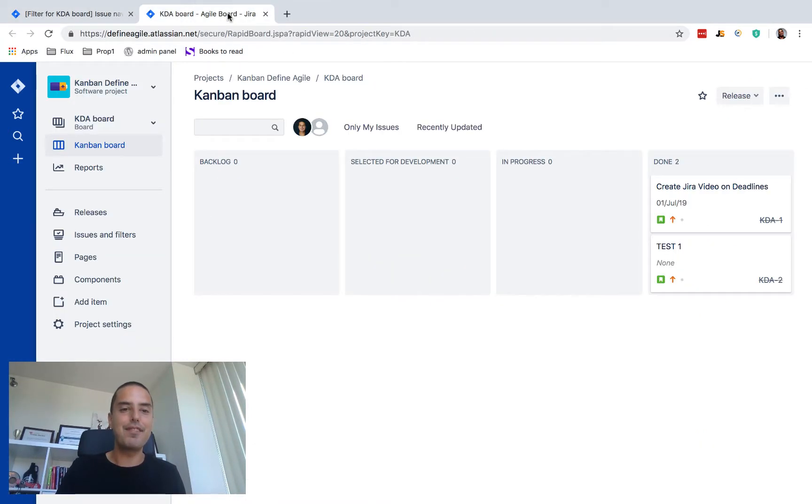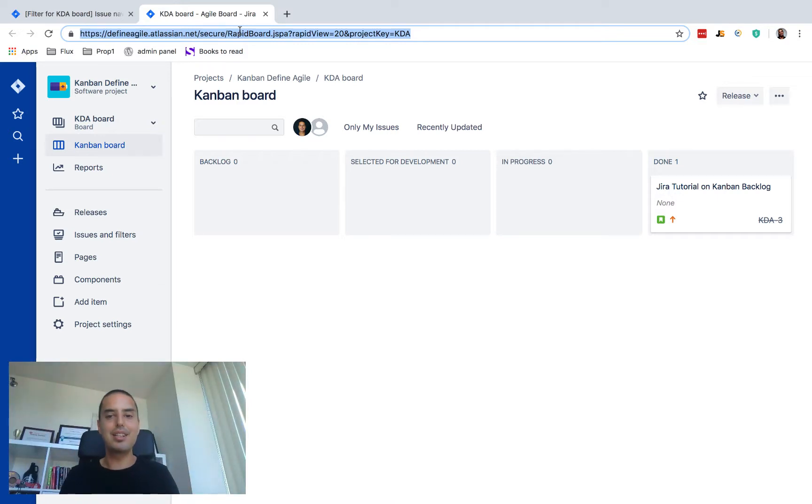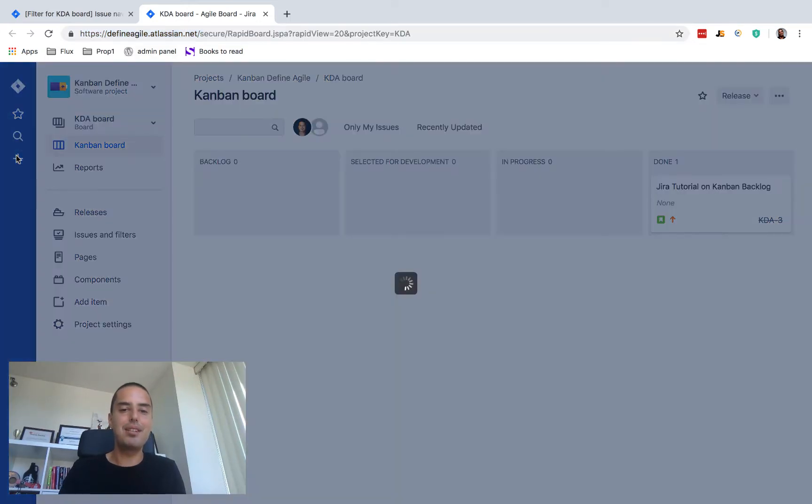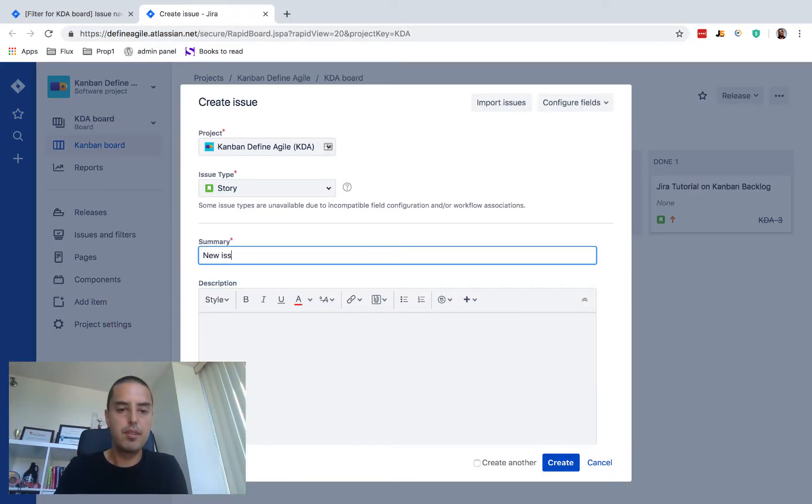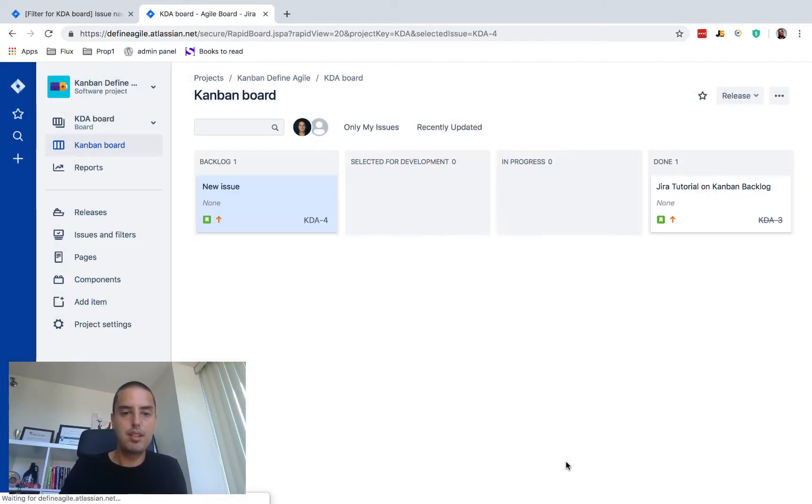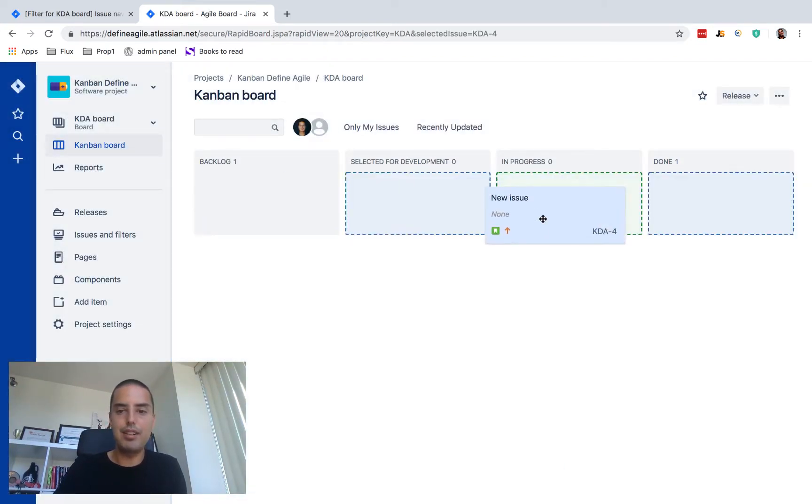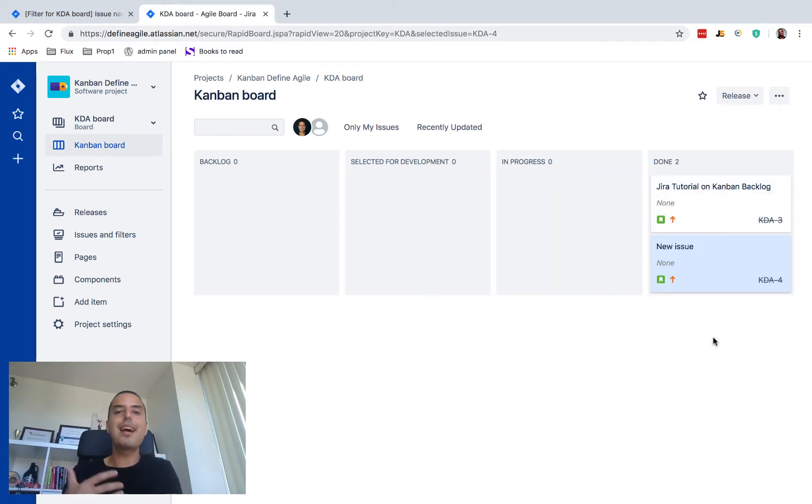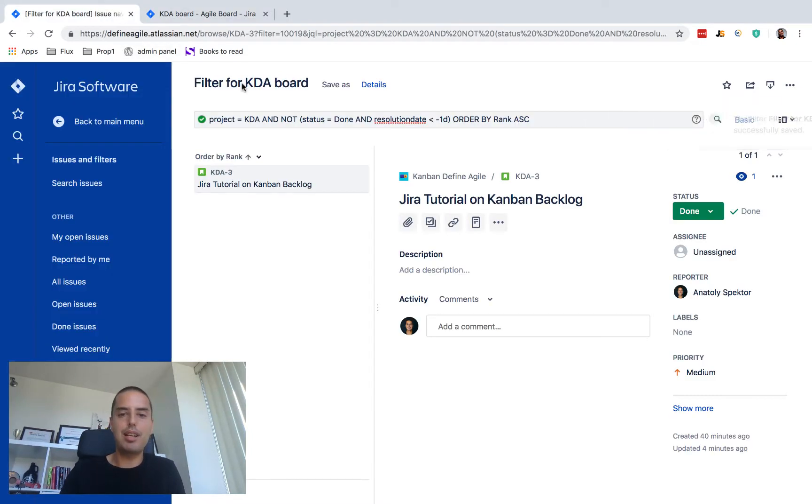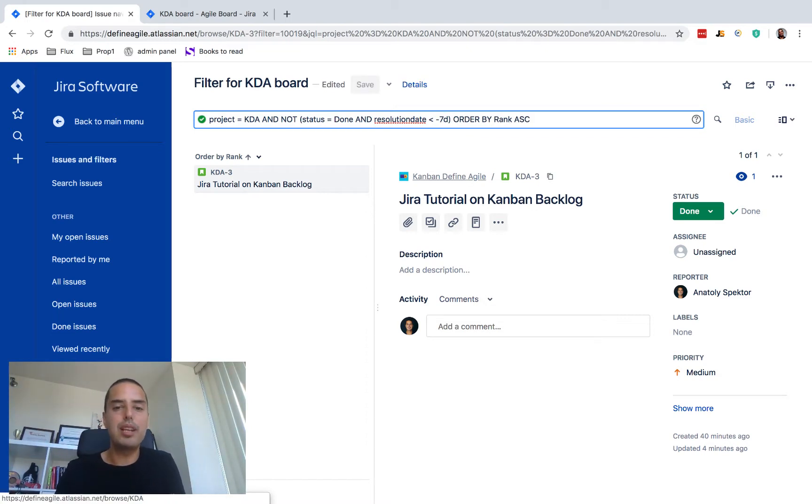If we refresh our new tab, oh it did automatically, don't need to refresh. So we only see the latest issues. If I create a new issue and then drag it to done, still stays here. But as soon as time passes, will be tomorrow, those issues won't be here anymore. And of course if you don't like one day you can change it to seven days and this will be your week.